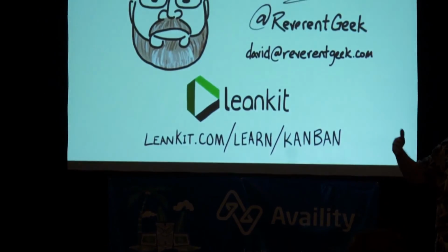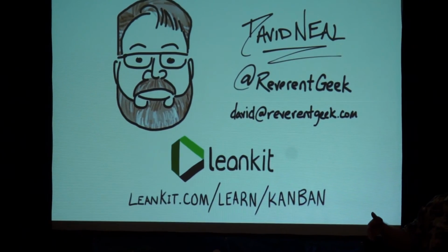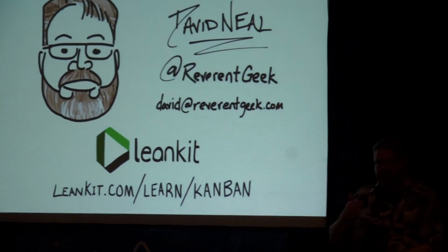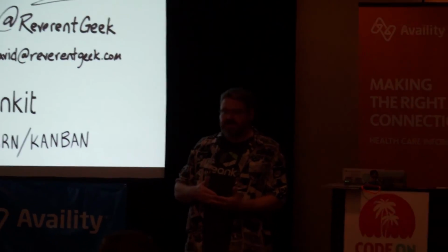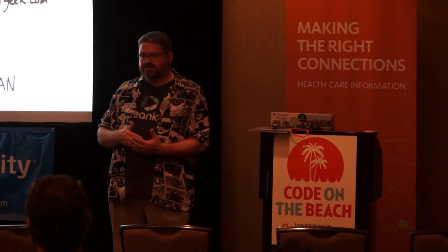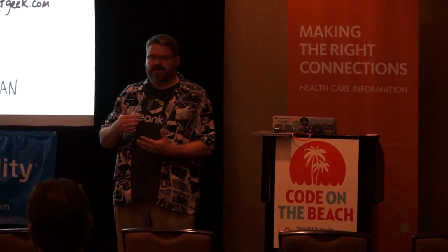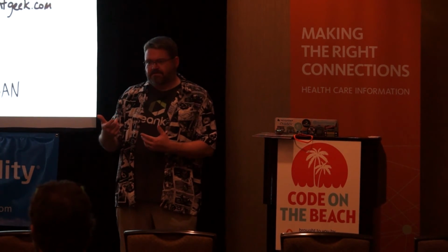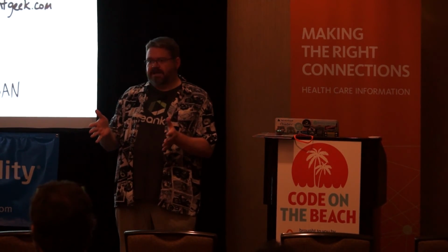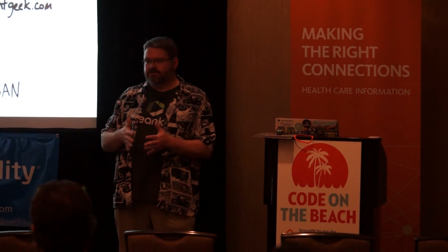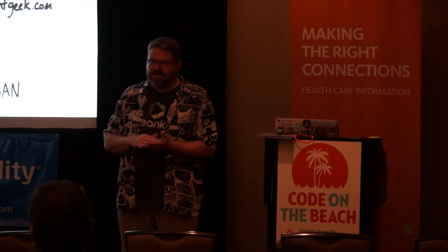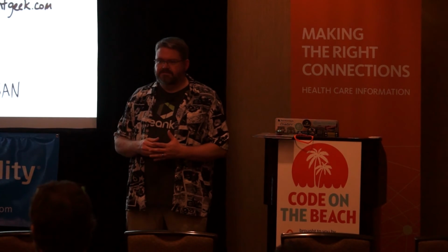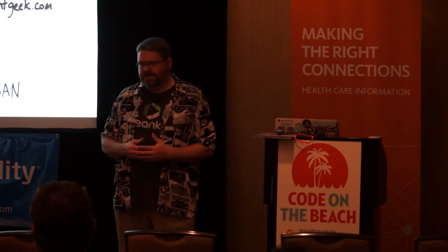And as we're working on that, we're adding tasks as we discover them. Some tasks up front, I know I've got to implement this page, or I know I've got to provide this information, but as you get into it, it's like, oh, now I know I need to do this and this and this. So you just keep adding tasks, and the parent card will show anyone looking at it what the overall percentage of being done is. And then all the metrics roll up into our reporting, showing what the effort is and all those things.